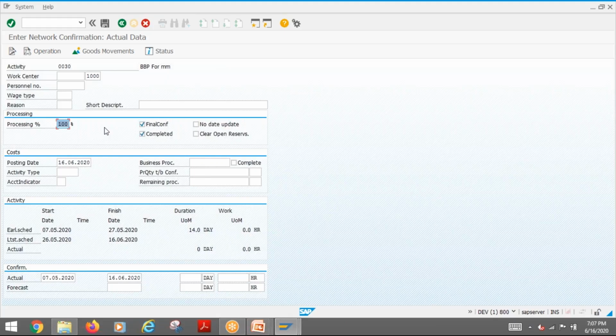So if you look at MS Project and all, only automatic confirmation is there. So if you put the percentage, automatically it will give you how much work is completed. So it looks like your plan and actual look similar. So that is the reason I was just talking about. There is a concept of baseline in other software. In SAP, we have versions, so I will show you that one after. Okay. So this is what we are talking about, the confirmation.